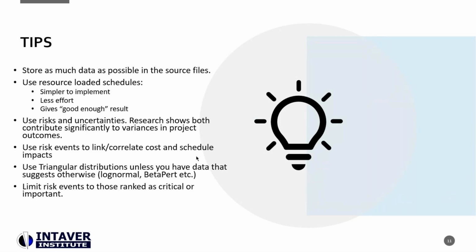But if you just use the resources to drive your costs, and this is what we're doing mostly in this example that I'll show you, it's simpler to implement, and it takes obviously less effort to maintain, and it often gives a good enough result. Especially when you don't have a lot of information yet, so maybe at the outset of a project, when you're starting to do some assessment on the level of possible outcomes.